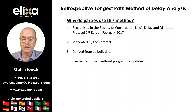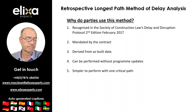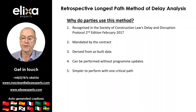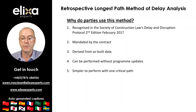However, I would repeat my comment earlier that producing an as-built programme with delays from scratch can be a resource intensive, complex exercise. It is also a method that is simpler to perform than other methods because it identifies a single critical path at the end of the project, i.e. the as-built critical path. However, the as-built critical path should be distinguished from the actual or contemporaneous critical path which identifies what was critical at the time, and in my experience this is more reliable in dispute resolution.